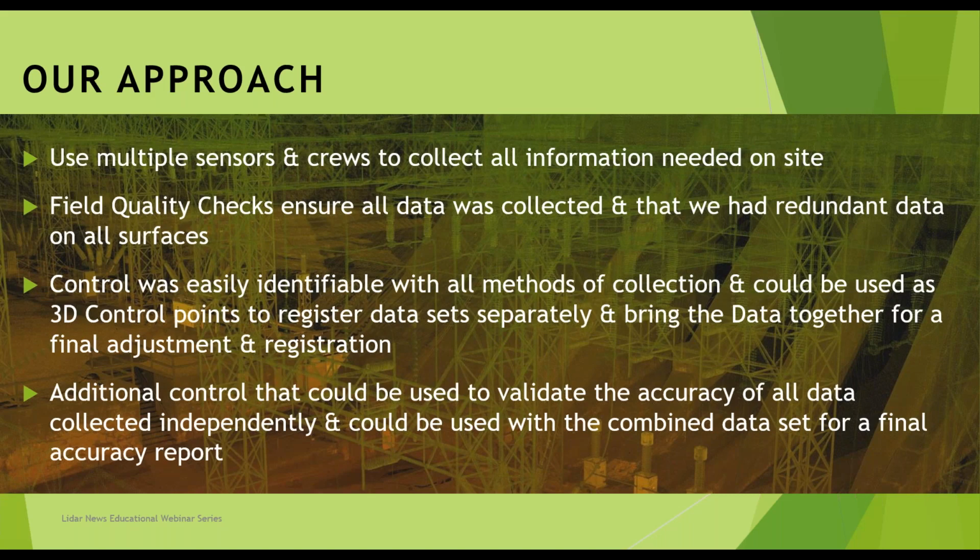As I mentioned, with the water drawdown and not wanting to affect the hydroelectric capabilities of the dam, we only were going to have 3 days to collect data. And unlike most traditional survey sites, there was not going to be an ability to return to the site to collect any missing data.